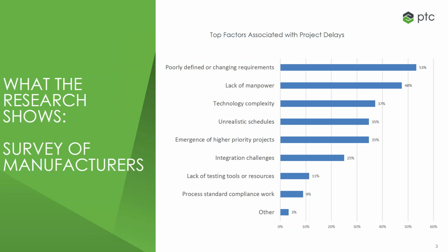And it's just a fact that in manufacturing and software environments, poorly defined and changing requirements are the single largest source of project delays. Right? So lots of things contribute to it, but poorly defined and changing requirements are number one.